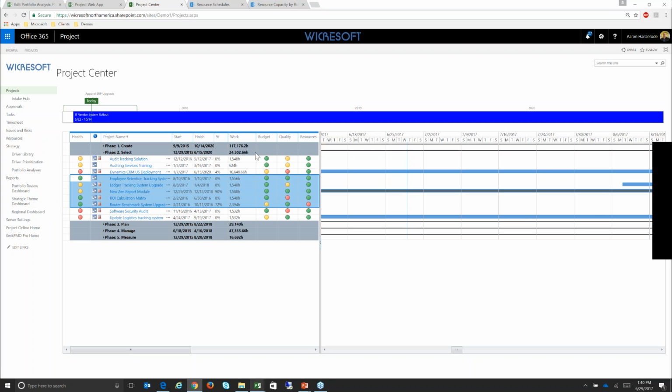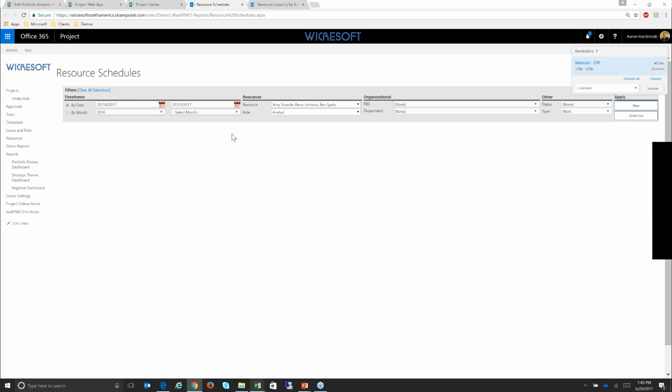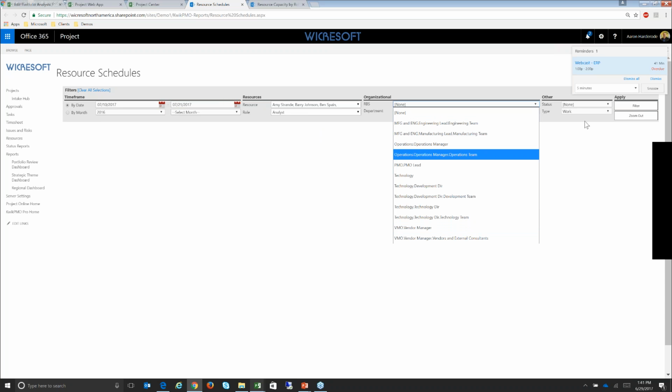As part of our Kickstart Plus product, we have some resource management and resource analysis reports that are built right into Project Online. Let me show you an example of a couple of those. If I navigate over to this resource schedules page, this is one of our built-in reports. Here I can select a time frame, start and finish, however long I want to analyze, weeks, months, whatever. I can pick my resources based on different roles, selecting one or more roles. I can also select the reporting structure in here, so where they are in the RBS.